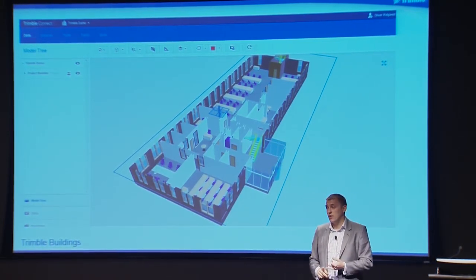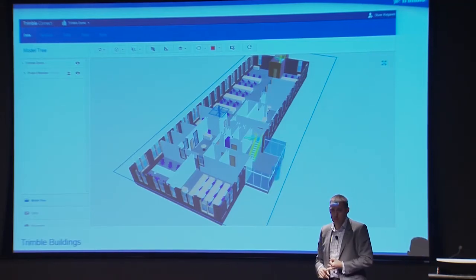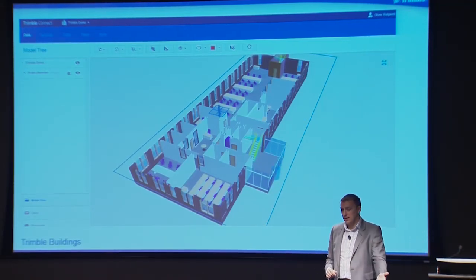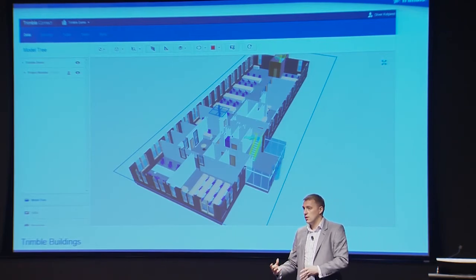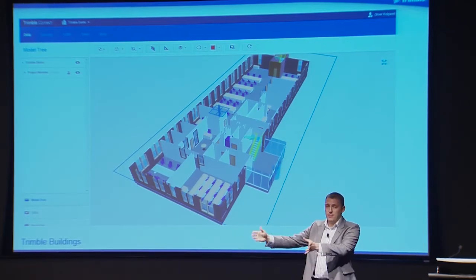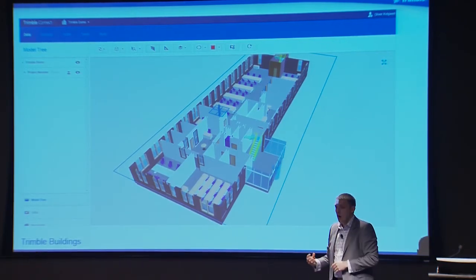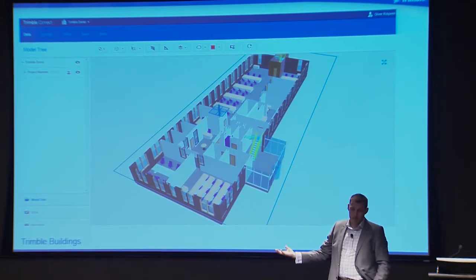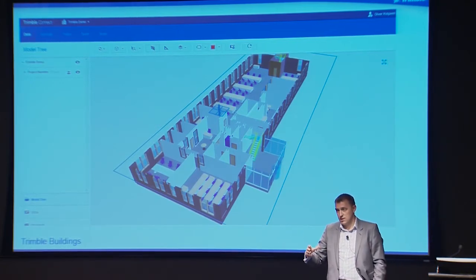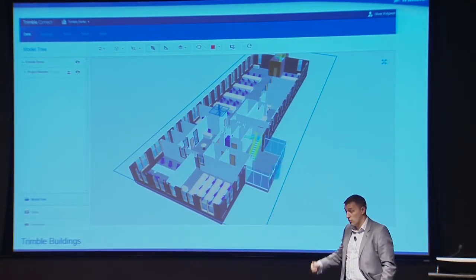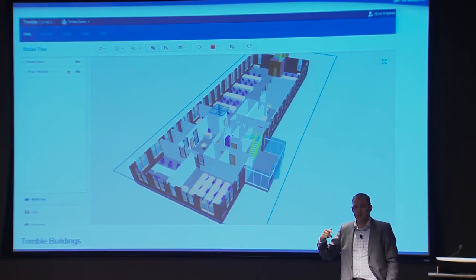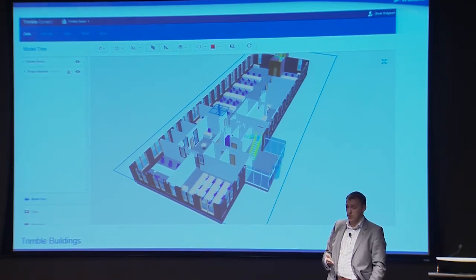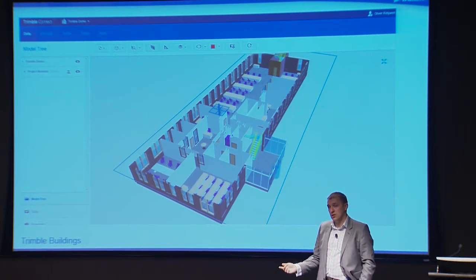There's been a UK government mandate for all new construction projects to utilise BIM to its best effect. And so the Environment Agency are now looking at all new projects having a BIM component. Off the back of that, again, they deploy the BIM details into a CDE or into Trimble Connect, and we're able to then draw that information down into the Atrium system on handover from the construction to the operation.